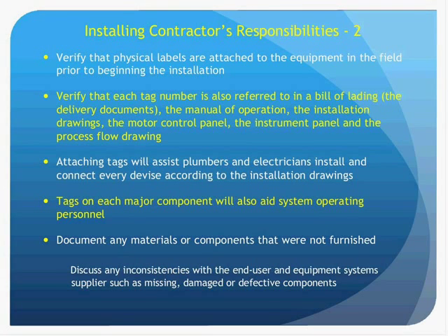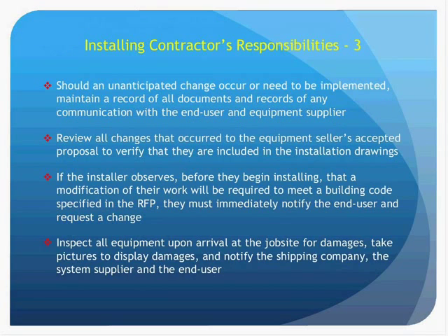They should document any materials or components that were not finished. An appropriate notification should be made to the equipment supplier and the end user. And an installing contractor should use their knowledge to discuss any inconsistencies with the end user for such items that may be missing, damaged, or defective. Next slide, please.